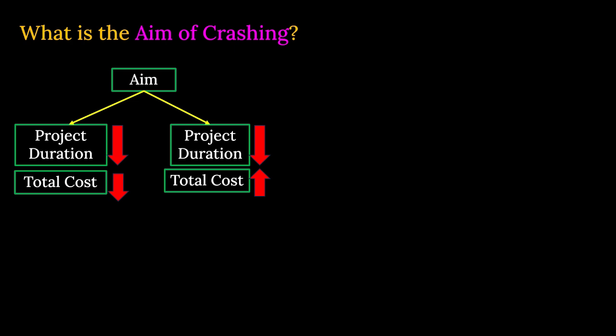And if your project is going to be completed by normal time, and as we know that by that time your event in the local area will start, so naturally you're going to lose the business. Maybe your business will be losing another 50 lakhs during that period. So that means your cost will be 1 crore of rupees plus 50 lakhs you're going to lose, because you're not going to earn out of that.